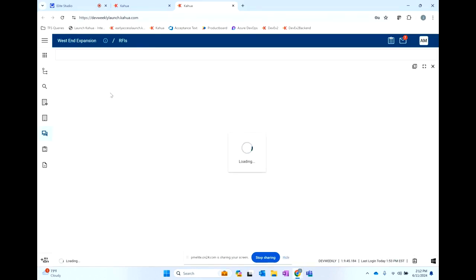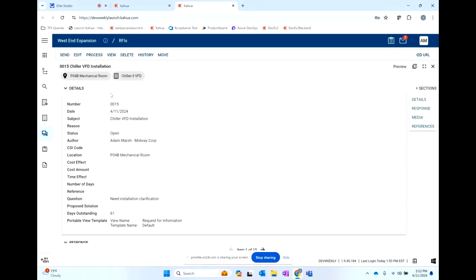And so what's really nice with the tagging of the asset documents is that there's no change in your process. So as you create your project documents like RFIs, your submittals, field observations, things like that, you can very easily tag the asset to that document that gets created. So you'll notice here on this RFI, this token, this chiller asset has already been tagged for the RFI. And I'll just show you real quick.